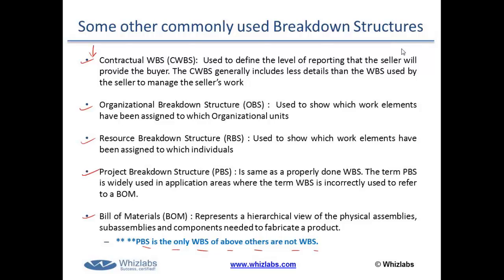At an initial stage, when you just simply create the work breakdown structure, the WBS would not have much information other than the constraints, assumptions, and who is the primary responsible person. But at a later stage, you can keep updating the WBS dictionary with more and more information to make it more detailed. Hope that answers your question. No, Janet, unfortunately, I don't have an example to show right now, but as I said, it's a very simple index-like document which explains the work packages with the help of the same numbering system.